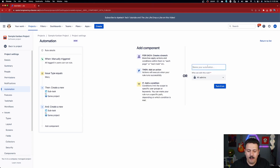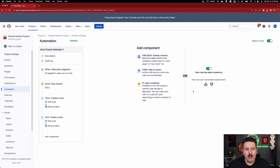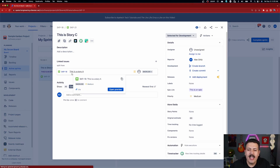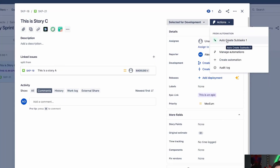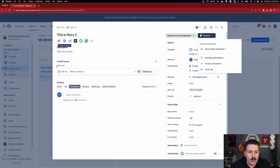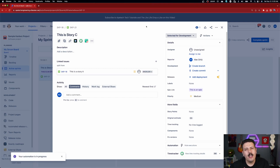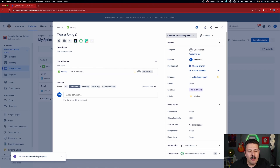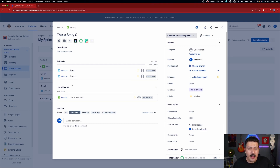Once you hit save, you're going to want to give the rule a name — something like 'auto create subtasks one' — and then turn it on. Now let me show you how this actually works inside of Jira. Go back to your project and open up a story. Because we did this as a manual rule, you have your actions up in the top right corner. Click on that, and you'll see 'auto create subtasks.' Notice that I don't currently have any subtasks. I'll click on it and give it a second or two — it takes a couple of seconds for the rule to execute. You can check the audit logs if it doesn't run. As you can see, the automation is in progress. After refreshing, when I open up my story, I now have my step one and step two issues automatically created.